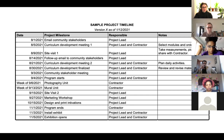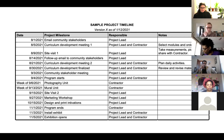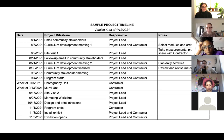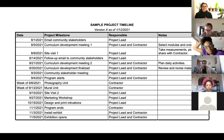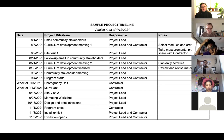Next I want to talk about timeline. I highly encourage everyone to work backwards from a due date — start with when you want something done, then think about each stage and work backwards to the very beginning. That is 100% the best way to do it. I also strongly believe in building in some buffer time for particular tasks — writing and coordination tend to take a little extra time, especially during COVID. I always build in an extra day for writing or coordination. The number one biggest pitfall when building a timeline is doing it in a silo and not considering your own work or personal calendars.